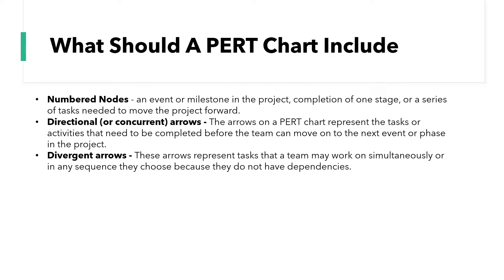So what should they include? Firstly, we need nodes, and they should be numbered. These are events or milestones which are required for the completion of a project, broken down into the different components that move the project forward. We also need directional or even concurrent arrows, which represent the tasks and activities that need to be completed. You may also need to introduce divergent arrows, which represent tasks that a team may work on simultaneously in any sequence that do not have dependencies.